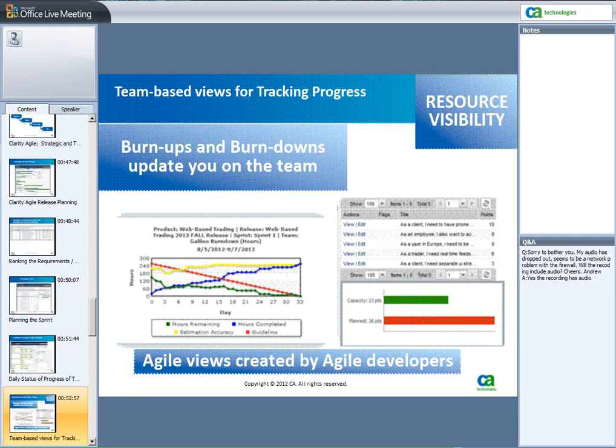This is a good example where you define your guideline for your project at the beginning. I'm going to do roughly 270 points. And what this looks at is, on a daily basis, how many hours are completed, how many hours are remaining on that particular sprint, and then even a place where how accurate am I with my estimating. Because over time, you would hope that people would become more accurate with their estimating. And as they get used to each other on a team, they work together and they understand how they develop and how they work and their speed, what they call velocity in Agile, they can do an effective job at estimating based on their past performance in past sprints. So it really is a way to keep track and use the discipline of effective project management to keep track of the way that the team is progressing on the project.